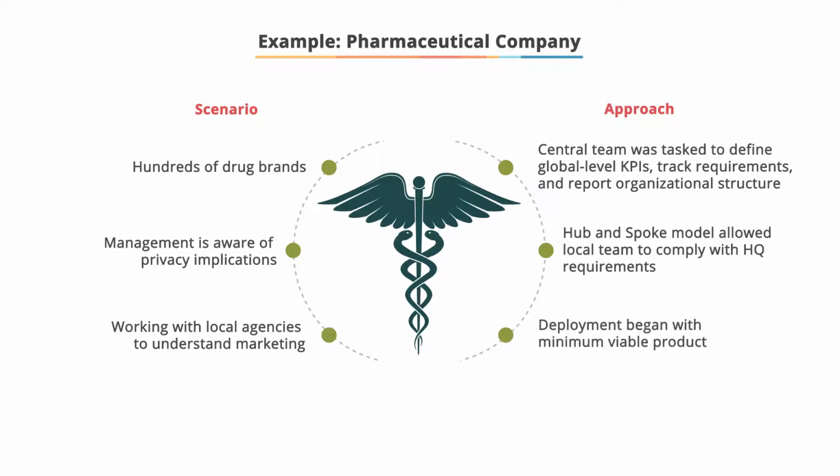Deploying at such a large scale had to begin with a minimum viable product. Attempting to impose rigid and complex requirements would have alienated the remote teams and led to the natural tendency to bypass the headquarters standards. So one important activity conducted with the extended team pertained to the clarification of roles and responsibilities using what is known as a RACI matrix.